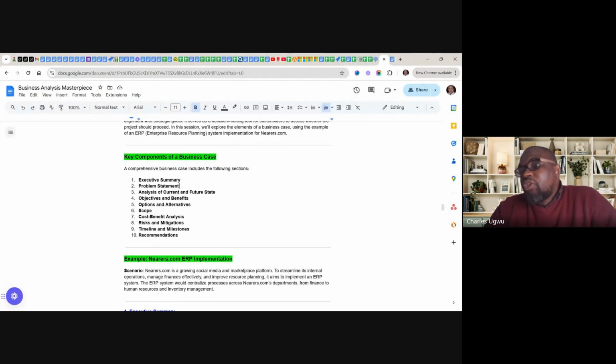That's why in most cases, during the initiate stage, business case becomes a milestone. Once you capture the business case, you can say you've come to the end of the initiate stage of the project life cycle. At this point, in some cases you might have a project manager, but in so many cases, project managers are not involved at this time.